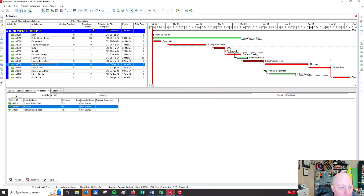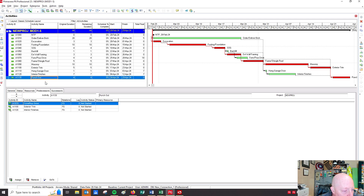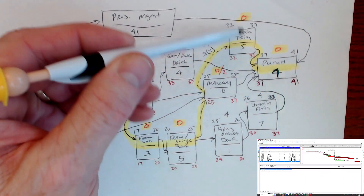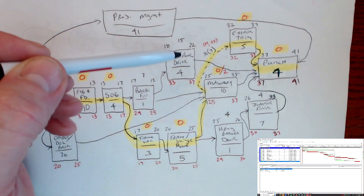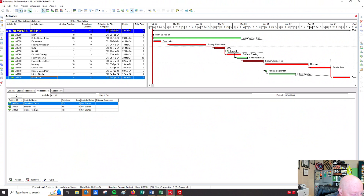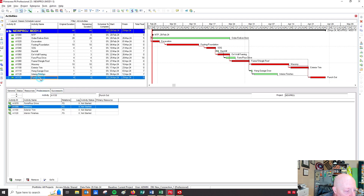Is that going to change my schedule? I'll hit the clock and schedule — no change. The other thing I want to check is the punch list. I'll click on punch out and hit predecessors. I've got form and pour driveway, exterior trim, and interior finish — but I thought there were four activities. Looking back at the drawing, punch list should have exterior trim, form and pour driveway, masonry, and interior finish. I am missing masonry. So I'm going to click the end of masonry and bring it down to punch. Now I click on punch out and I have four predecessors. I'll hit the clock — no change.